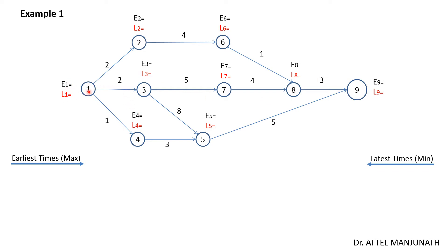First, write the event numbers and against each write E1, L1, E2, L2, E3, L3, and so on up to E9, L9 for the last event. Normally the earliest time for the first event is taken as zero. We calculate earliest times using the formula: earliest finish time of activity i-to-j equals Ei plus d-ij, where Ei is the earliest time of the previous event plus the duration of that respective job.